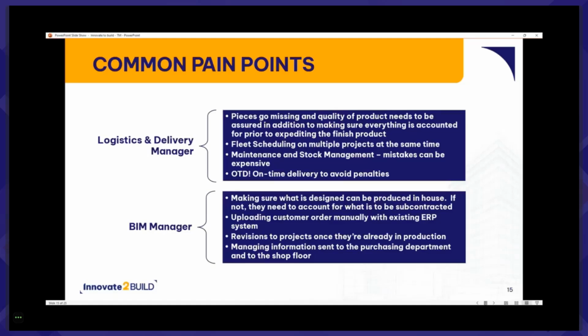So then the exercise of nesting is usually done by an engineer or someone in the design department, if there is a design department. And with nesting, you want to execute nesting maybe on multiple projects at the same time to have your orders be simplified for the purchasing department. And if there's a discrepancy there with ordering too much material, not enough material, it's not the blame game, but it always can come back to either head of purchasing or the designer, depending on who's responsible